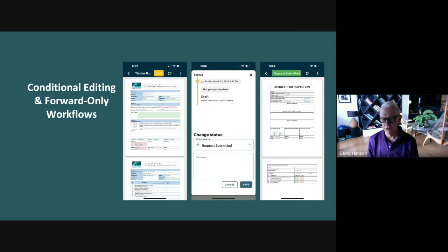So every time you change something, as you can see here, you can add comments. But let's say you have another issue where you've assigned a defect to a main contractor to fix, and now that issue is late, say it's been late for a month now. You can't send an email notification again because you've already sent the original notice, but at any time you can go in and add a comment, and you can direct a comment back to the person who's responsible.